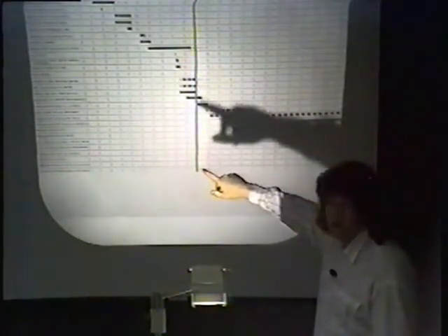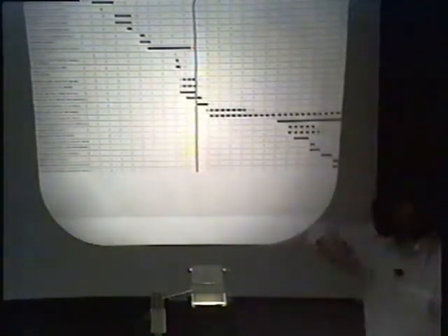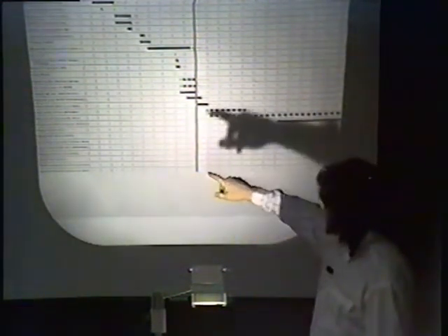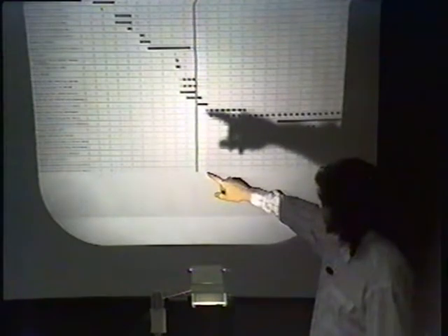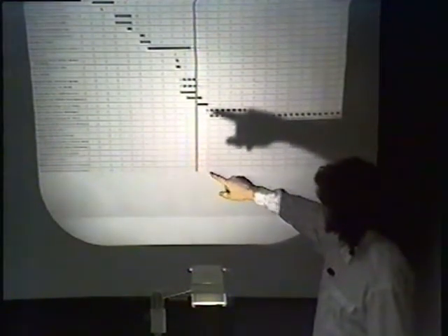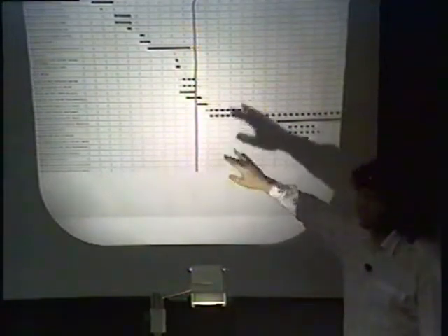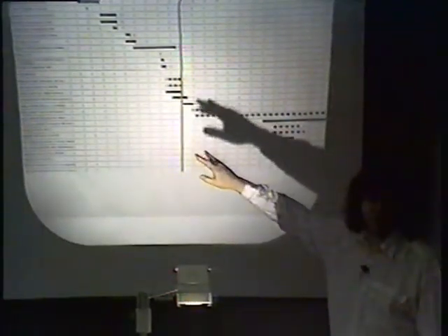Freeze UNICOS after it is stable. At some point, you've got everything built, running, and working. Hopefully that is like a week. A typical time might be a week for a stability period. Then we begin into our local feature development.